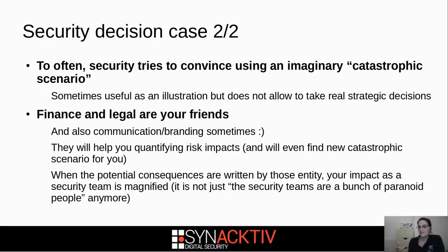So like I said, finance and legal are your friends. Call them. They will help you quantify risk impact, and honestly, they will. One time, I wanted a security function, and the IT was saying it costs 12 million in one shot to do it. And when I went to finance, I learned that actually my security function could make the company gain like 8 million a year or something like that. So the decision was not the same after that. They even sometimes find new catastrophic scenarios for you because they know their job.